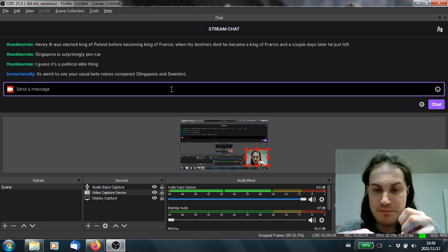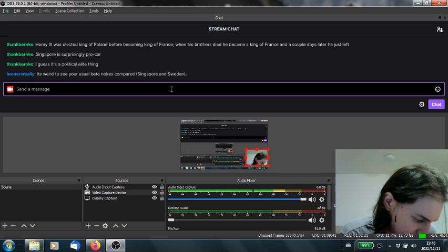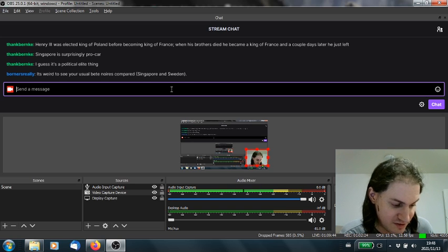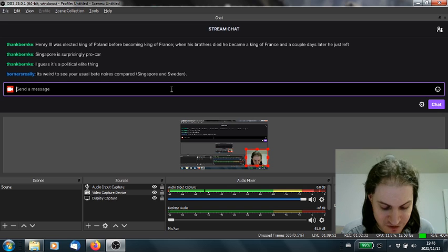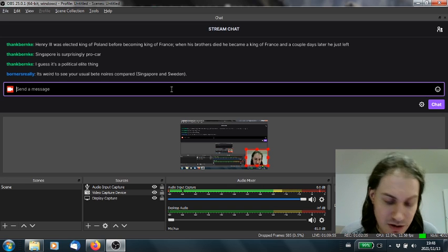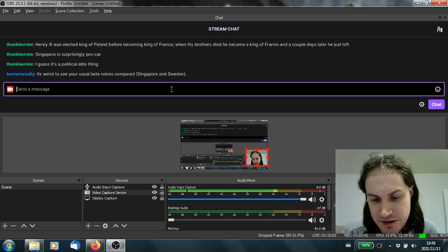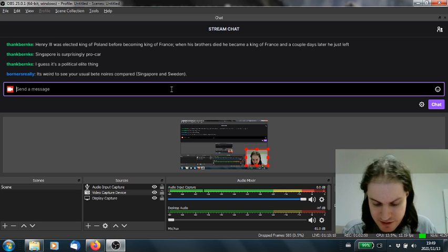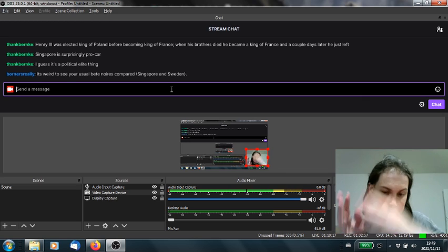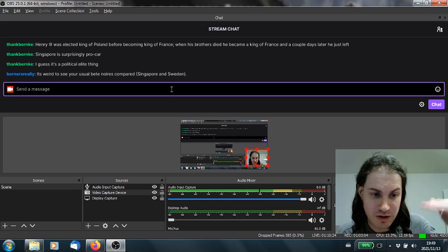So because of that, there's this idea that design build, which means you bundle the design contract and the build contract into one bidder, is somehow more modern than design bid build, which is where it's kept separate, because historically this might also mean that the public sector did the design. And even when it doesn't, it oversees the design very closely. This is how design bid build is supposed to work. The public sector, if it does not have enough in-house expertise, buys the design from an engineering firm. It will then own the contract, so it will own the design, again closely supervised to make sure that it's good. And then it will bid it out to builders. So design, bid, build. Design and build, or design build, is where you skip the bid phase, so one contractor will do both.